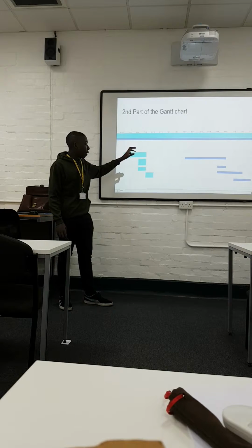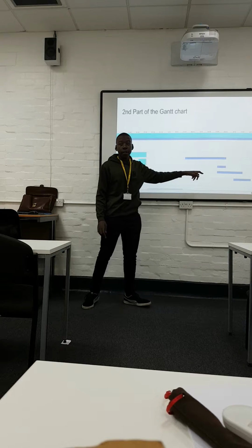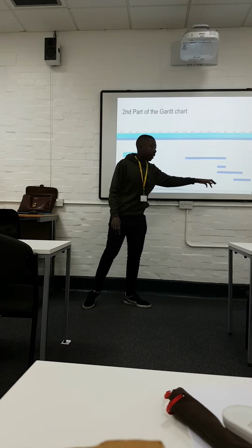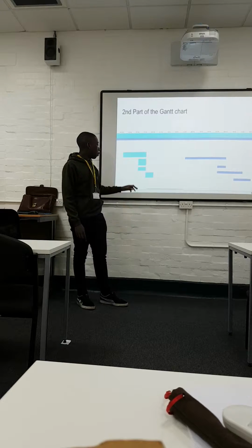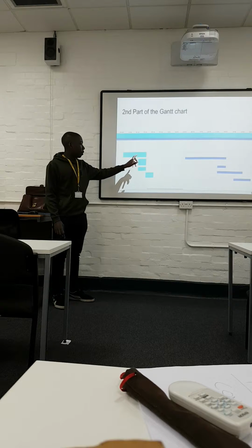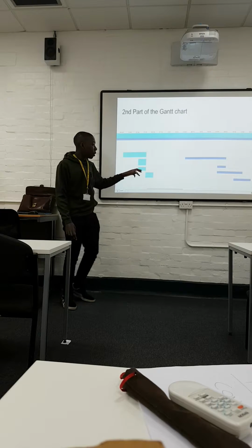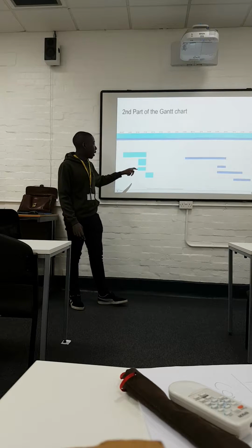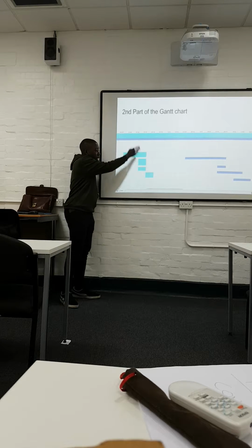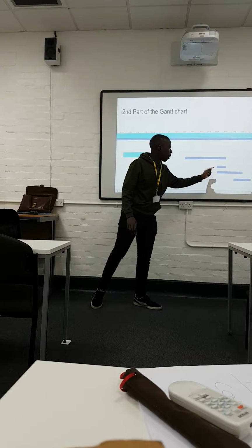And by doing that, it also delayed everything else. So they're actually debugging it, rebuilding it, and testing it again. Another thing also was this one here is the tested one. This one here is the debug, the rebuild. And as you can see here, I wanted to do the build, test, and debug all in the 1 week. But instead, I did the debug for 3 weeks.